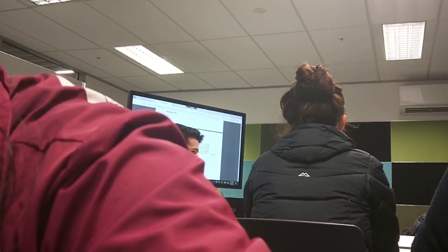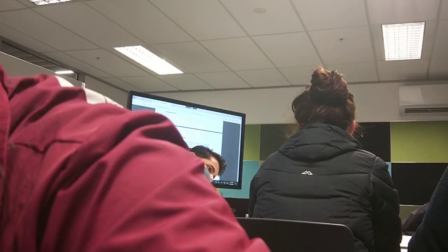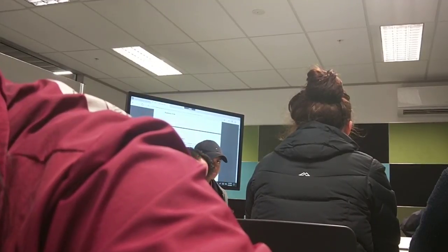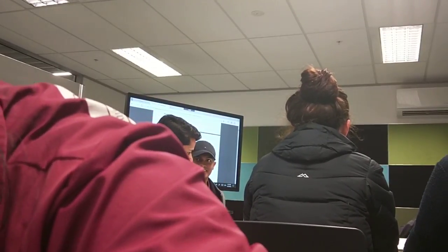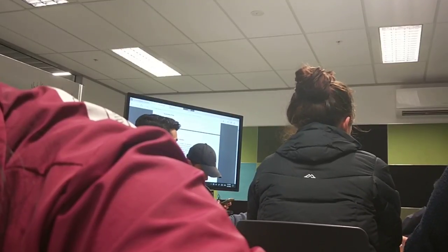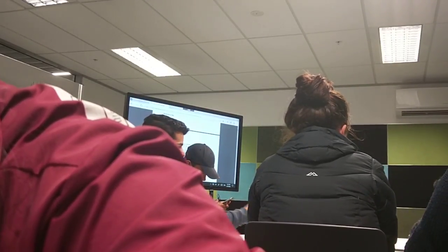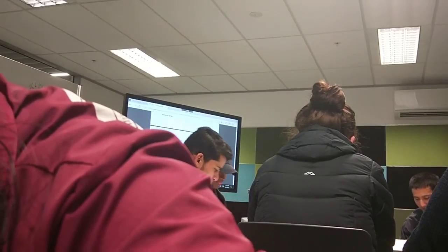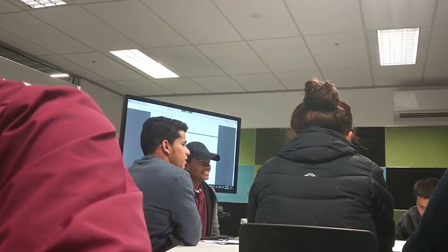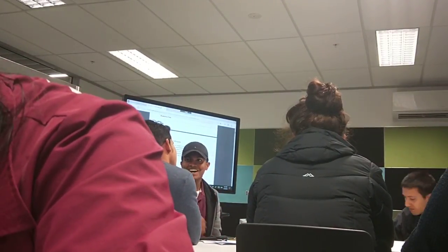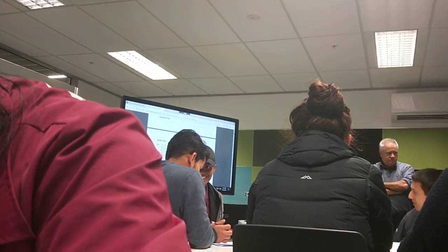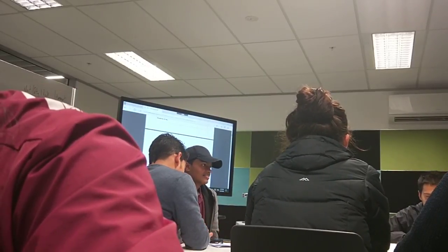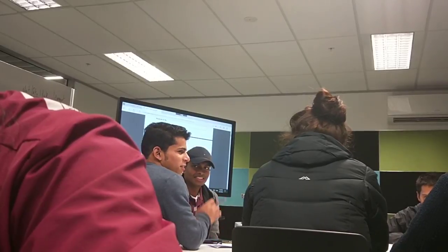Okay, let's go. Yeah, so risks could include calculation errors, CAD operator cannot produce drawing on time, client changes mind, final design does not meet client requirements, engineer's estimate too high for client, and client delays in approving preliminary designs. That's just the basics. You can still put other points in because the markers are just the main thing. As long as you have a sensible risk in there, I'm pretty sure he'd give you the mark for it.